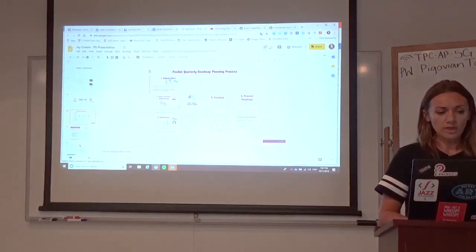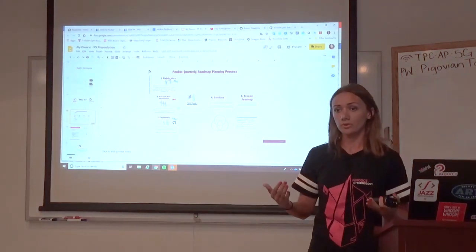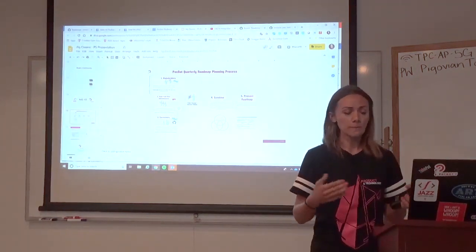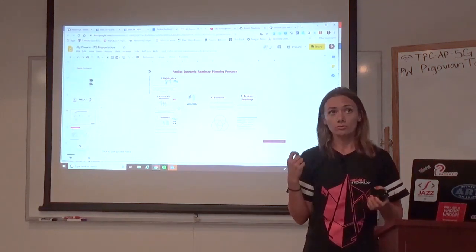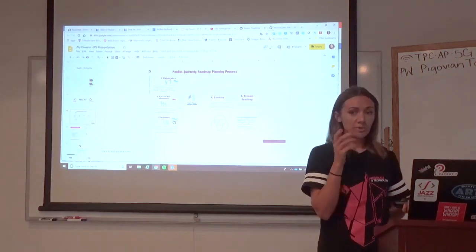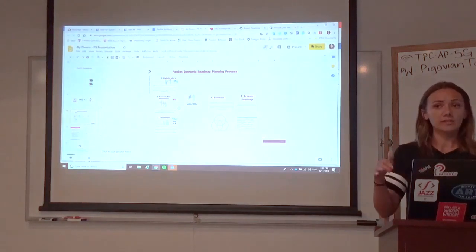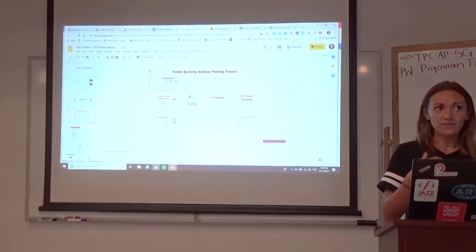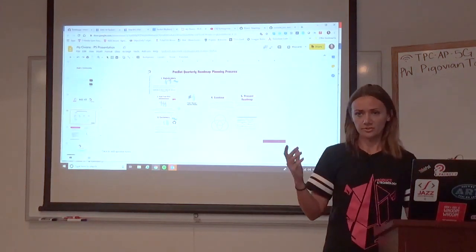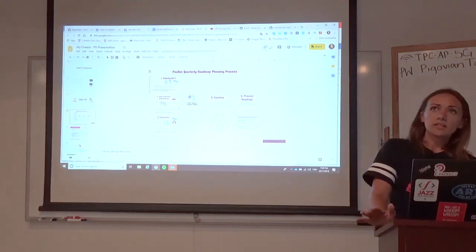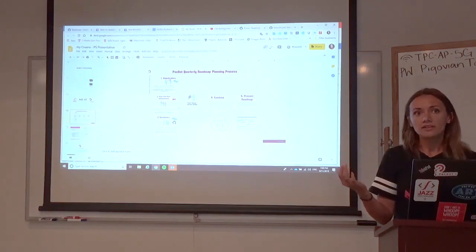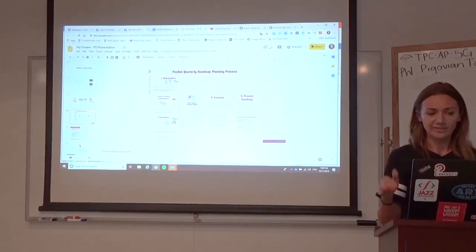So anyway, after I had this discussion, now I'm ready for the roadmap planning session. I have like 10, 12 different features, maybe more. And I know that my team per quarter will do about 960 story points, right? So I break it down. I know my percentage, because this is like the rules of the game, and this is something that we came up with that works, right? We may change it later, but we are clear on the percentage. So, okay, 960, we already went through different features, we sized them. Of course, there's a lot of guesstimation, but still, it's better than none.